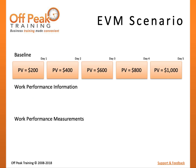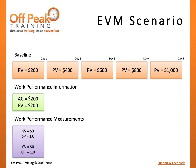Let's revisit our scenario from earlier, this time calculating performance. Our Budget at Completion was $1,000 and the project was scheduled to take 5 days. Since each task represents 20% of the project work, the Planned Value of completing Task A is $200, Task A and B is $400, and so on, up to $1,000 for all work. On Day 1, you complete Task A at a cost of $200. Since you completed 20% of the work, Earned Value is $200. Schedule Variance is zero and Cost Variance is also zero.